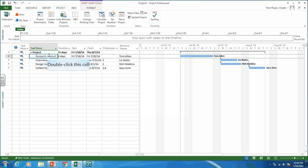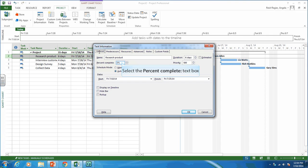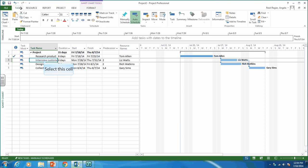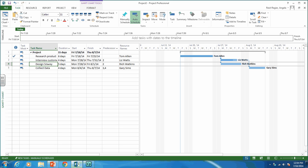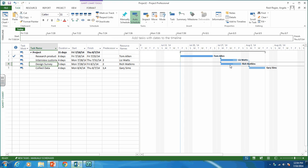Tom Allen is 100% complete. One way to do it is to click on the task, go to the general tab, and set percent complete to 100% — it shows a check mark because it's done. Interview customers: Liz Watts is 75% complete. On the task tab you can see there's a 75% option, so I can status it that way. Design survey is 50% done — another way is to go to the bar and drag it to about 50%. And Gary Sims is 0% complete.